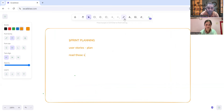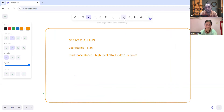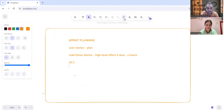Continuing the sprint planning discussion: if the acceptance criteria around making an account active has ambiguities — such as for how long it remains active without a transaction — those points need to be discussed during sprint planning. Non-functional testing criteria not written in the user story, like response time and parallel user support, should also be raised.